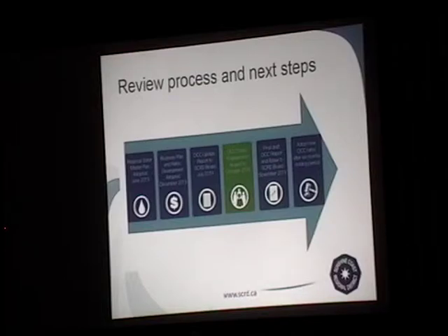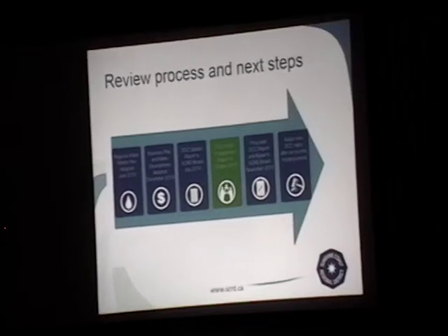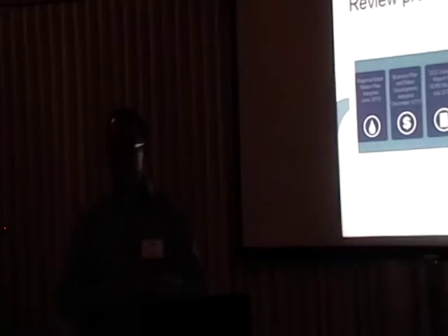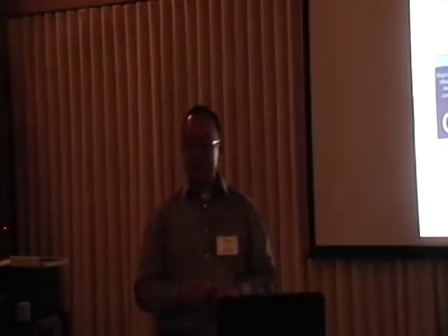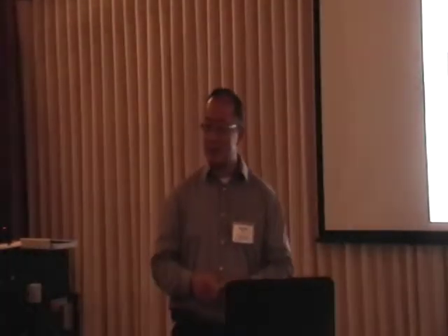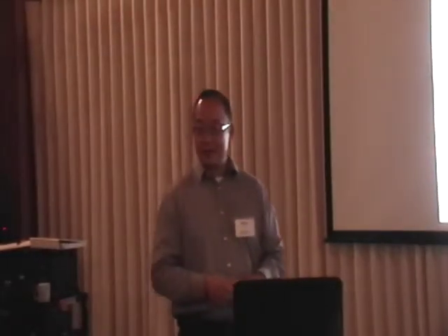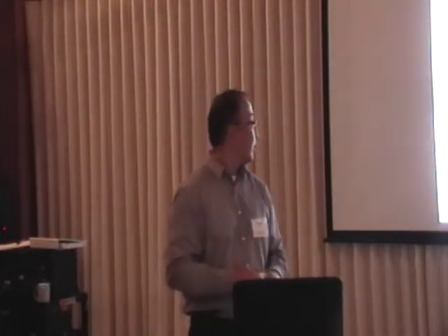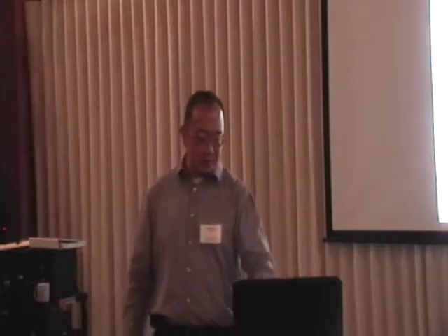Get all that together, amend the draft report as necessary, get that back in front of the board, which is the next step. We're hoping to have the new bylaw adopted by year end, but we're also recommending that the new rates don't go into effect for 6 months after adoption. So there will be a 6-month holding period where the current rates will still apply after the new bylaw is adopted. So it'll be the middle of next year, if everything goes according to the schedule, where the new rates would kick in.